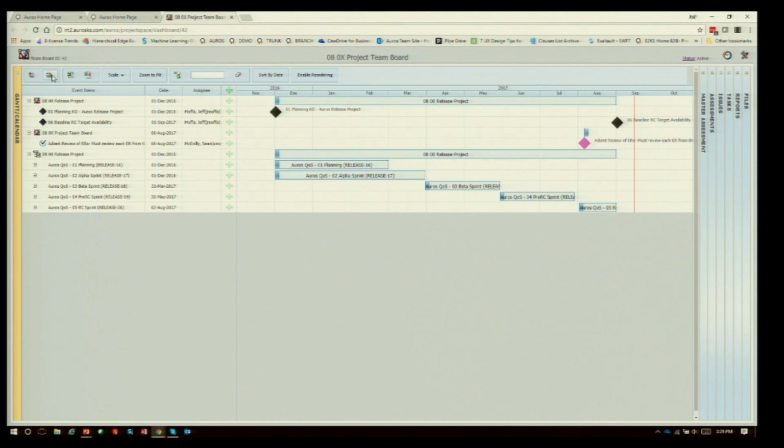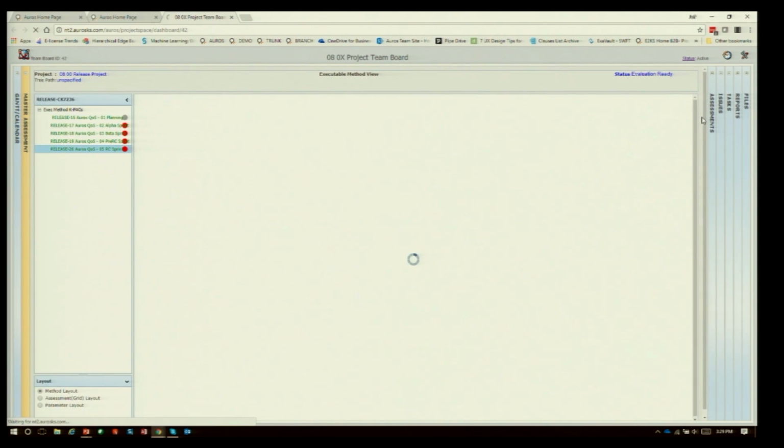It works just like the way Wendy was telling you it works, where what people are calling flags, we call checkpoints. The checkpoints are derived dates that are team-specific that react to milestones that are set top-down. So the milestones are the black diamonds. They're set top-down, and they're shared across team boards. And then the team-specific timing is set by these checkpoints. The checkpoints are derived based on these milestones. So we can set a date we want to release, and the whole plan will back itself out, specific to the team.